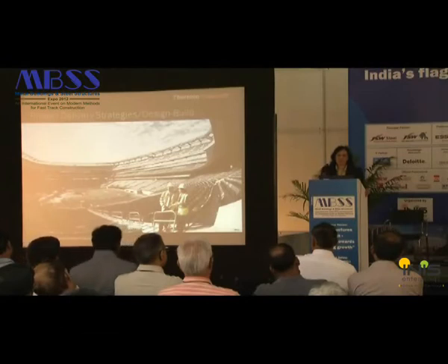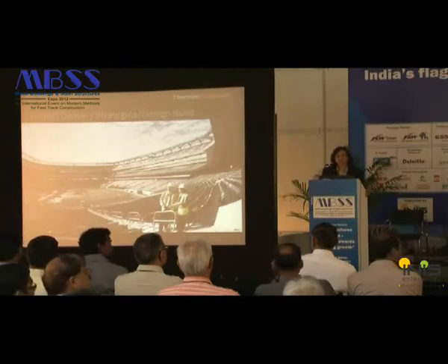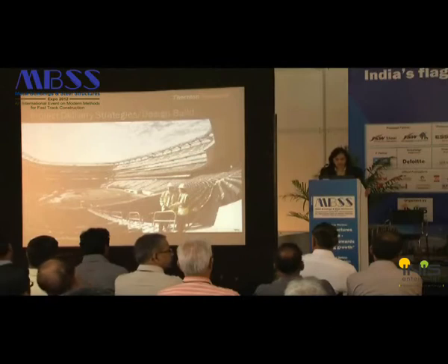In USA, stadiums, especially sports facilities or any of these kind of venues, are very critical because their opening date is set in stone. Every day of delay can cause huge penalties to the contractor. So this was a design-build project where the contractor was also on board, and that's why we were able to order the steel.